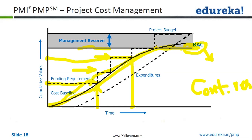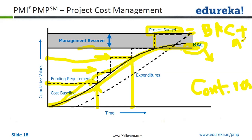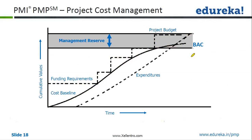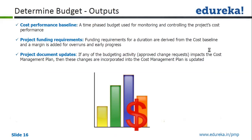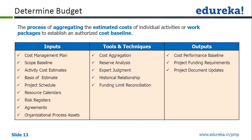When I say project budget, I add management reserve to budgeted actual cost and I get this project budget. Essentially, project budget equals BAC plus management reserve — BAC plus MR. That's what I wanted to tell you from a cost baseline perspective. Now we'll go back to the Determine Budget slide.